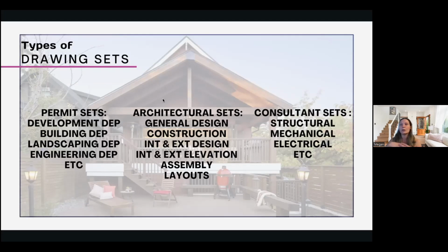So for example, the buzz topic these days is multiplexes. If you were building a multiplex on your property, you would need to submit for a development permit first, and then you would submit for a building permit second. And the building permit is the actual structure that's going on the lot of land.